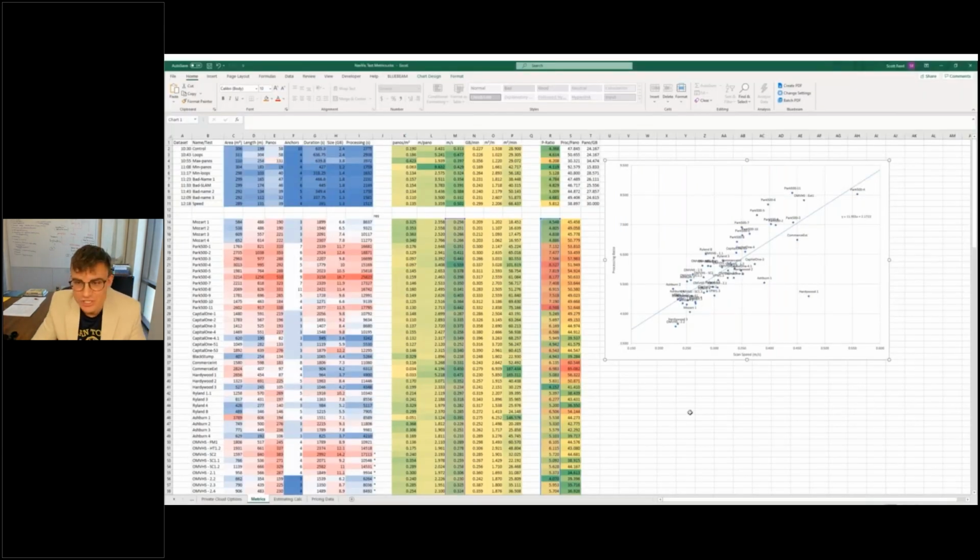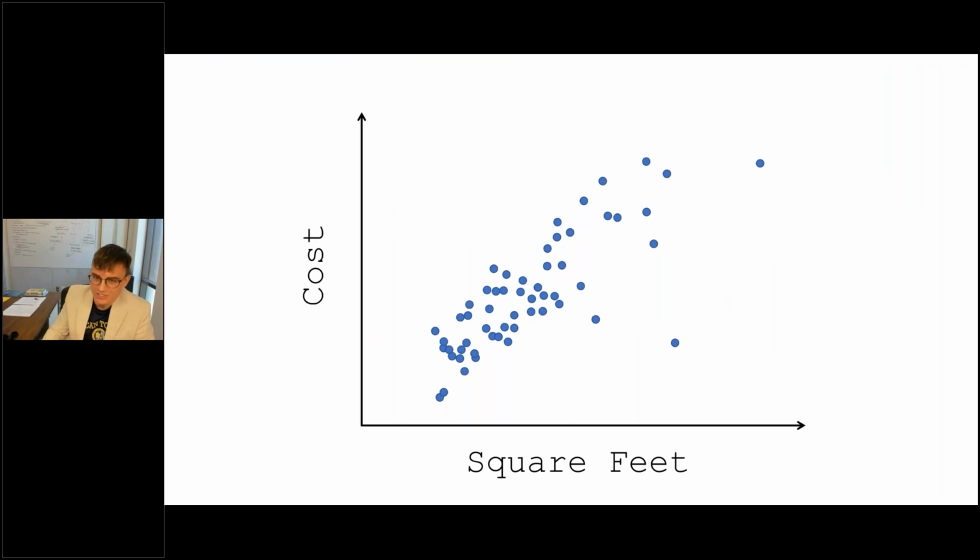But you'll get the question so much, you might as well embrace it. Using historical data from your own past jobs, you'll be able to provide a somewhat informed answer to these sorts of questions. When studying historical data, there will be a distribution of costs associated with every square footage. Estimating based on square footage will not be pulling from the center of this distribution, but instead from the top, because you want to hedge against uncertainty and risk. You don't want to go underwater on a project.